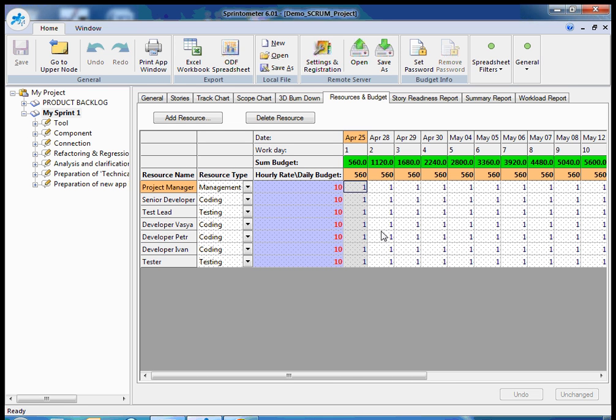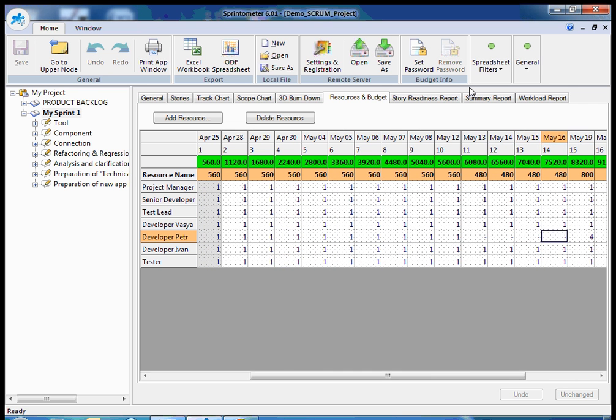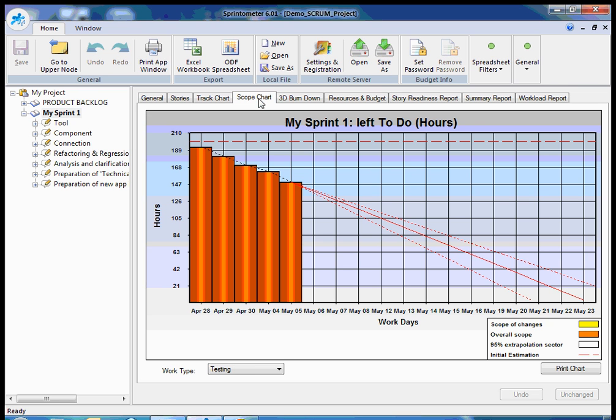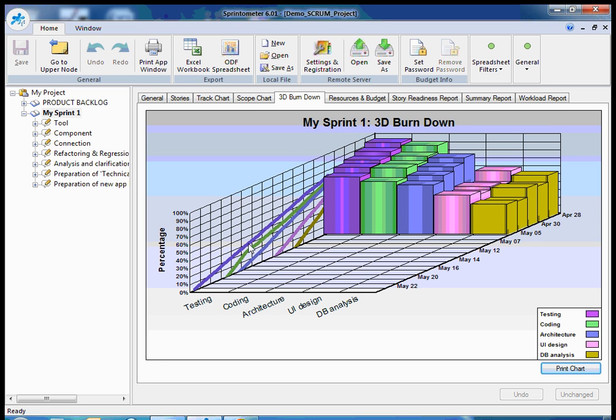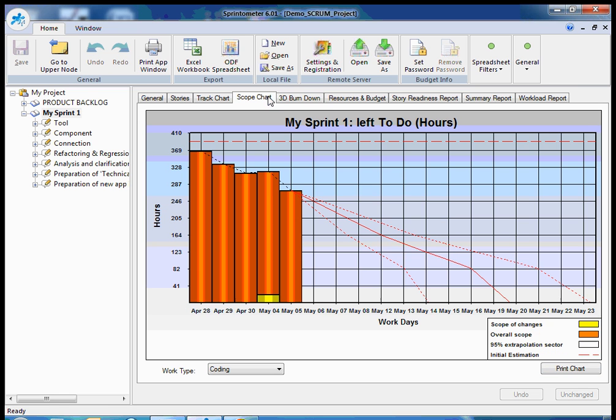And you see here I have variable team composition. That's why I need to use this tab. And on the level of the scope chart, for example for developers, you see the line is variable because the team will be changing. Some people will go on vacation, then I will have additional team members. That's why the prediction is different. And I can see this on three-dimensional and on normal burndown charts.